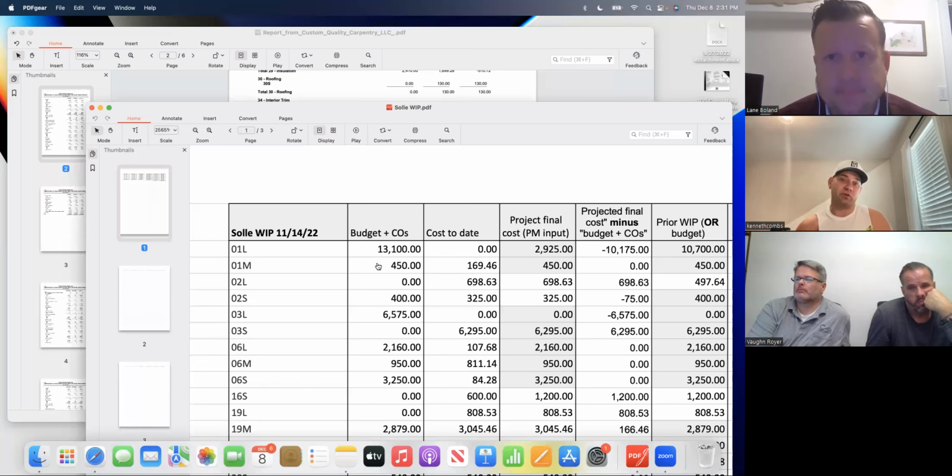What this also tells you, when you do it line item by line item across all these jobs, is you see trends of mistakes in estimating, missed things, and then we go and we solve those. So we would see we were continually missing a shower glass. It was always underestimated because we had $2,500 in there, and he would come in at $2,750 or $2,860, and we noticed that across all the jobs. So then we changed it and we raised that amount to $3,000. So we made sure we covered what it is. But unless you're doing it line item by line item, you would never catch those trends, if that makes sense. And that's just another benefit from it.